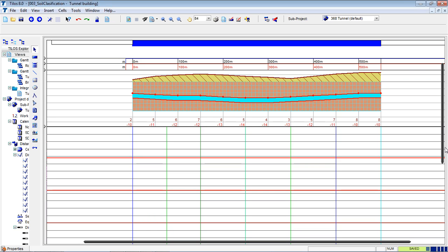I said, okay, TBM. Well, it still depends, Tekin, because of the TBM capacity. And another very driving factor is the soil classification. I said, well, we are in the tender phase. We don't know if we will win it, so we don't have soil analysis. And if my friend is really smart, he will tell me, listen, Tekin, it is much better you talk with your company management and try to make some soil analysis or buy some soil analysis.